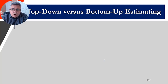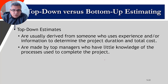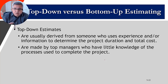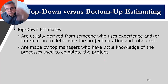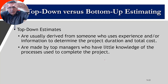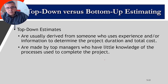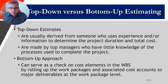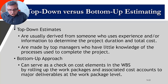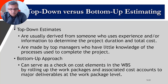Top-down estimates are used by someone with experience in a similar project. Even without full knowledge of the new project, they can relate it to a previous one and estimate the duration based on size, then break those estimates down across major deliverables and sub-deliverables on the WBS. Bottom-up estimates work the opposite way: once you finish your WBS and have the WBS dictionary, you associate cost and time to each work package, then add those up to get the project total.